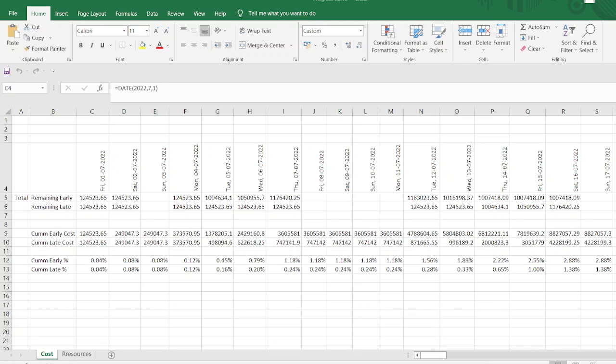Month normally is not an issue but normally weekly percentage or values are affected because the weekly values we are getting from Primavera is the end of the week. And the week already we defined in the settings of the Primavera. And what is happening actually in the actual life of the project is that we are making the project status report or weekly report based on the client or consultant instructions and date based on the weekly progress meetings.